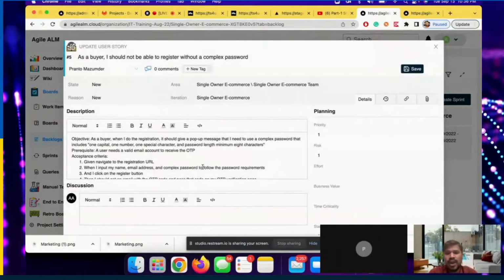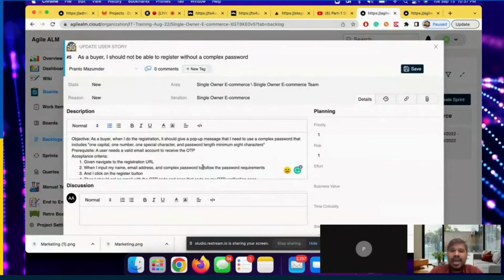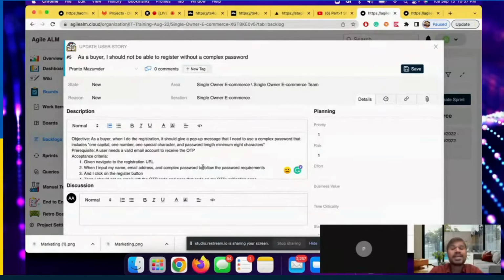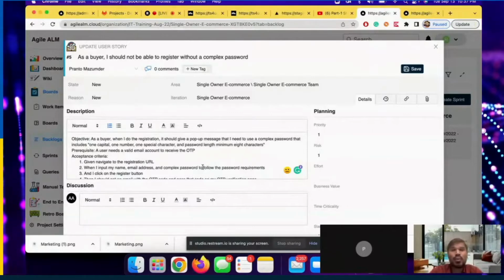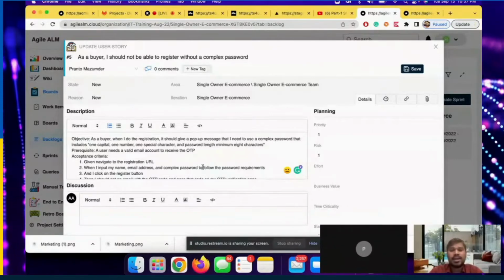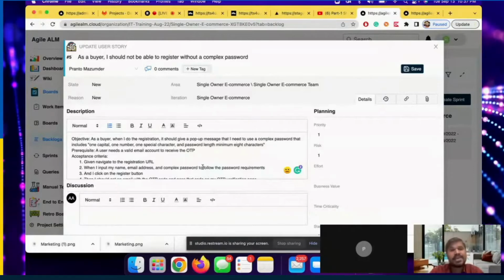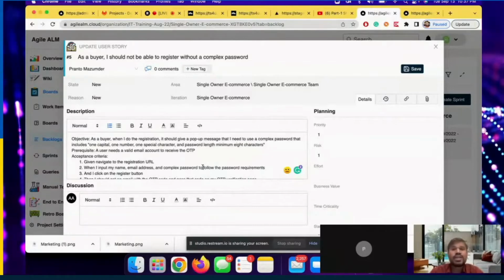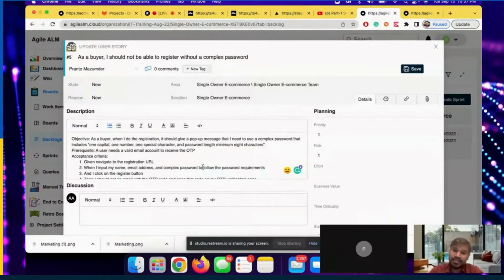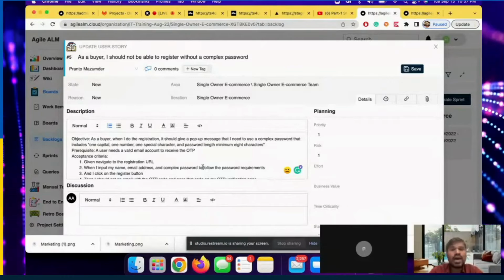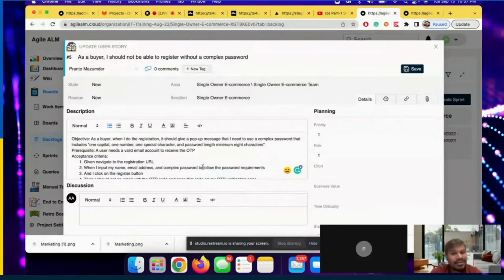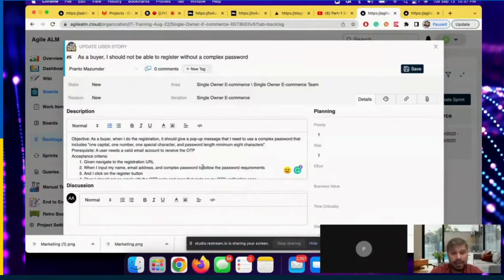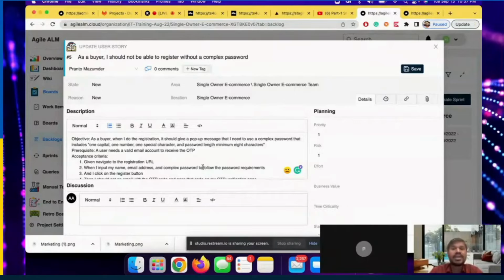That's the goal. In the planning meeting, all the development team members are present. A planning meeting normally takes 1 hour, depending on what the product owner decides. It can be 90 minutes, or 60 minutes. In the planning meeting, the user stories that are ready for development are planned. It means in this sprint, those user stories will be developed by the development team.